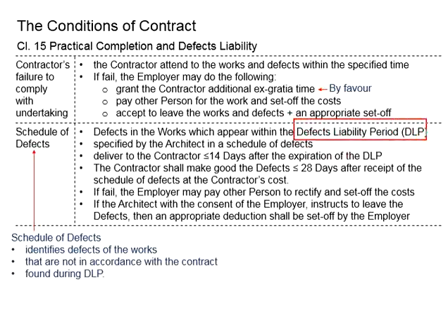After the defect liability period ended, as long as the schedule of defects is delivered within 14 days, the contractor will still need to rectify it. If the schedule of defects is sent after 14 days, the contractor has the right not to entertain it.